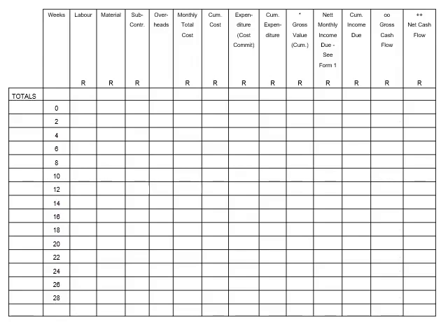When we record and calculate information, it is always assumed that these costs occurred at the end of a period. For instance, labor is paid at the end of 2 weeks, and we receive a statement for materials purchased during the month at the end of the month. This is very important for understanding the timing of the budget. Let us start with labor, and record the information from the summarized cost schedule.